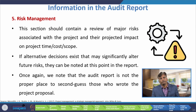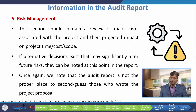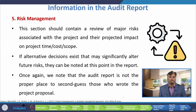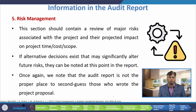The next important item expected from the audit report is risk management. This section should contain a review of major risks associated with the project and their projected impact on project time, cost, and scope. If alternative decisions exist that may significantly alter future risk, they can be noted at this point in the report. We note that the audit report is not the proper place to second-guess those who wrote the project proposal.